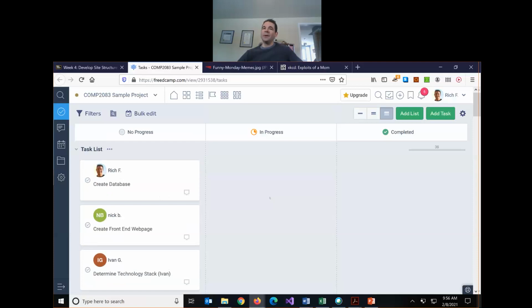So for example, a customer asks you, let's say we have an input form, we have a registration form. And let's say there's maybe 10 inputs on that form. And we build it all, we get it all up and running, and then our client takes a look at the form and says, actually, there's one more field I want to ask users for when they register. How many things do we need to do to add that one input, right? The customer thinks this is going to take 5 minutes, right? You just add another label and input on the form.